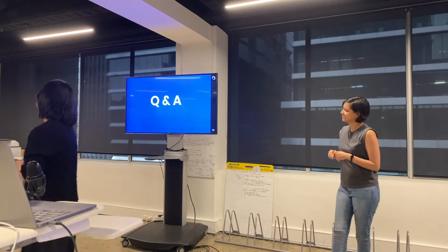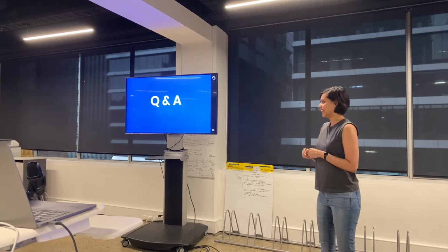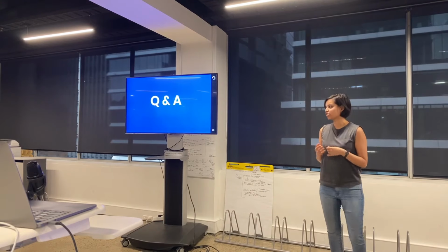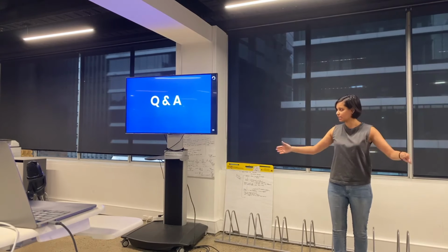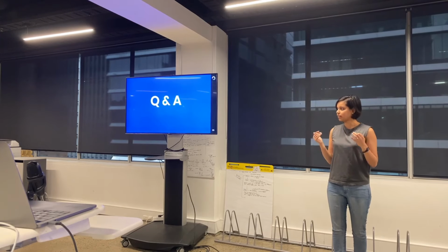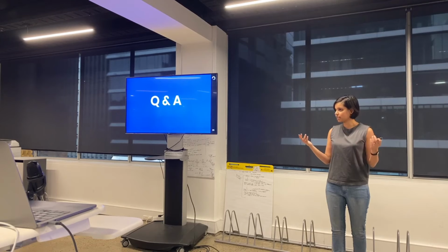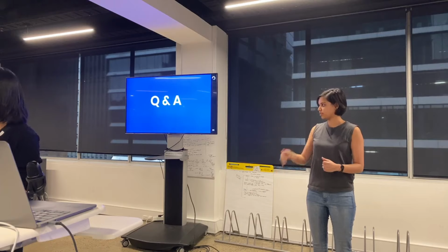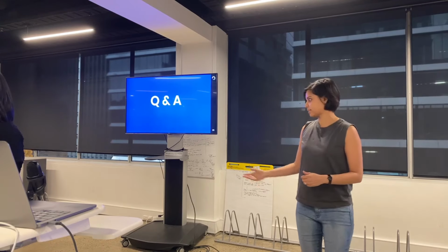In case the stories are interdependent, then what happens? Just following up on the previous one. The stories will always be interdependent. No matter how much you try to keep them independent, there are always some dependencies that you will find out. What you try to do, as I mentioned, is create the foundation stories in the MVP itself, and then take on the enhancements. You can't start building the enhancements even before the foundation is ready, right? And that's how you try to sequence it as much as possible.